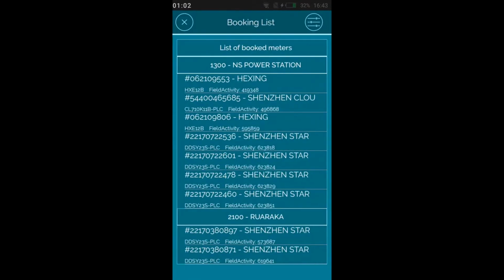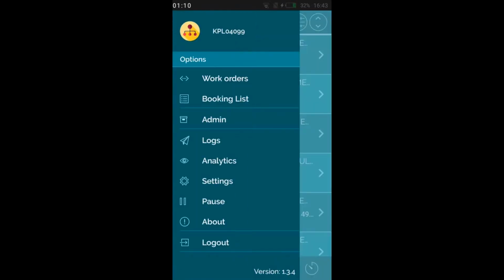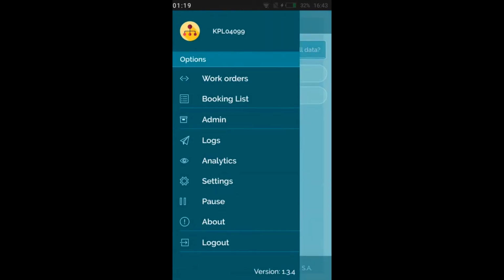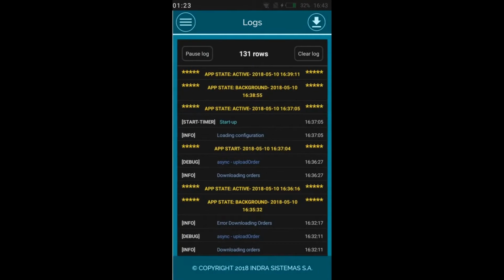A work order is a document that describes a job between a customer and a contractor. Work orders can be generated for use within an organization, but they most commonly serve as a contract between the customer and whomever they contract to execute the desired work. A work order includes a description of the job with an estimate of what it will cost to get it done, including labor, parts and materials.